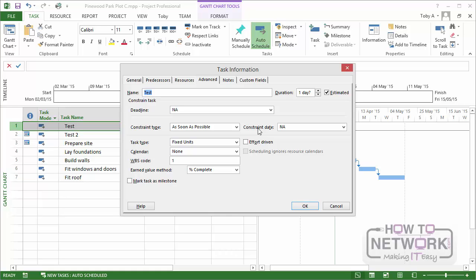By default when you add a task to a project that's scheduled from its start date, the default constraint for the task is for the task to start as soon as possible. Now at the moment, because we haven't looked at scheduling in any kind of detail at the moment, it may not be apparent to you what the significance of as soon as possible is. But just to summarize the significance of it, as soon as possible means that as soon as all of the requirements for this task are in place, that task can start.